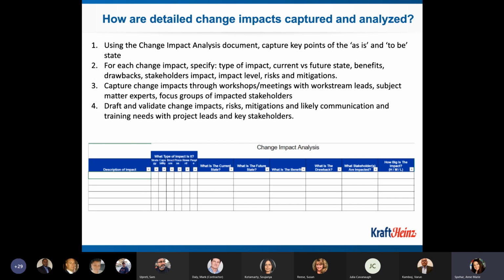So when you're doing your requirements gathering, those requirements, and then your design documents, will give you some of that input. Another thing that's really helpful is doing a current state and future state. So you do the current state process and future state process, and what is that delta between them? That's your change impact. And so that's always useful too.